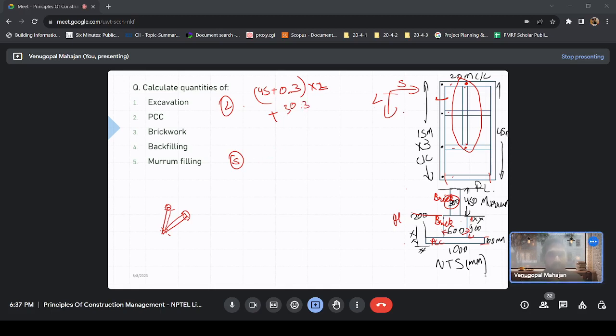Now come to short walls. So for these two short walls, as you can see, for this one short wall, it is quite clear. This one, S1, is equal to how much? 18.7, 0.3 or 0.6, 19.4. Center to center distance is 20. The width is 0.3 here. If we are going with 0.3, right?